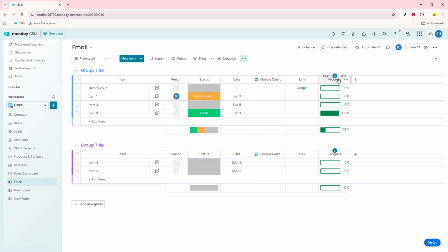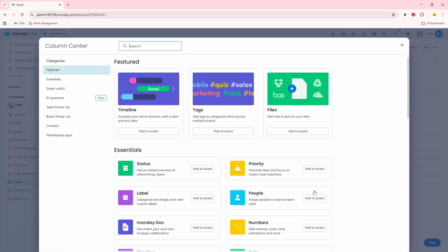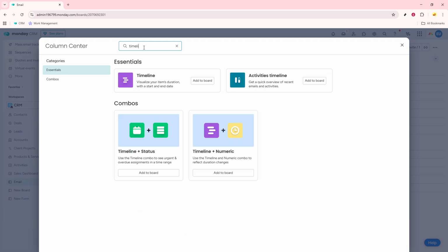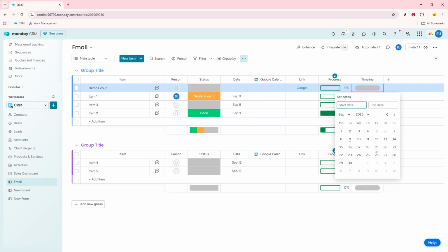Now, if you find that the Set as Milestone option isn't directly available in your version of Monday.com, there's an easy workaround. What you'll do is set the start and end dates within the timeline picker to the same date. By doing this, the system recognizes that this specific date has significant importance and automatically turns it into a milestone visually. So, in your Gantt or timeline views, this date will be marked distinctively as a diamond icon, helping you and your team easily recognize its importance.